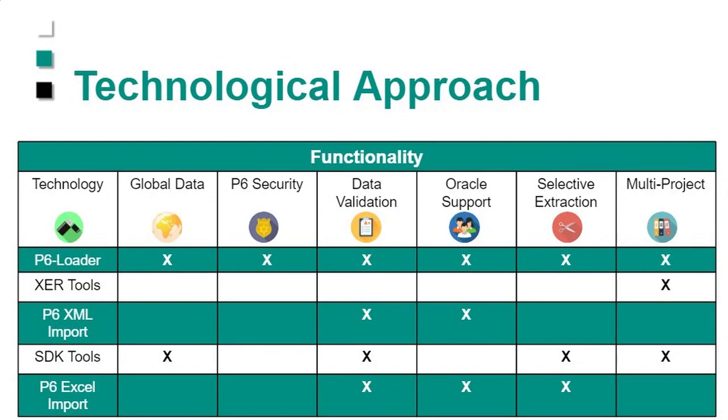Finally, Primavera came out with the idea of an XML import, and the idea there was to improve on the functionality of the XER files. And it is better. It is supported by Oracle. However, if you manipulate it, they're not going to support it. It does have data validation as well. However, it's single project only, so it's very limited. And again, it doesn't allow you to access global data.